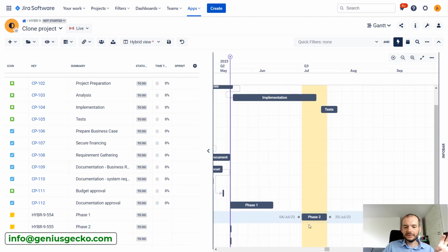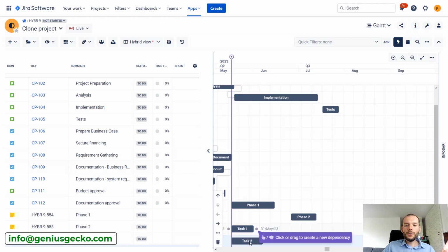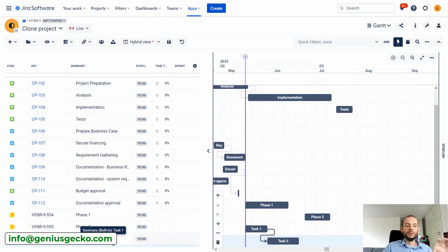And I can start doing the planning. So yeah, I will expand it, I will move it around, create dependencies. I can see what my plan with these tasks would look like. You could do this also with standard Jira issues. But yeah, at certain stages you do not want to put a lot of information into Jira because most of it will have to be removed anyway. I can create over here 2 or 3 different plans on different sets of basic tasks, then remove 3 of them or live with just the one that we agreed on, and it will not unnecessarily clutter our Jira instance.